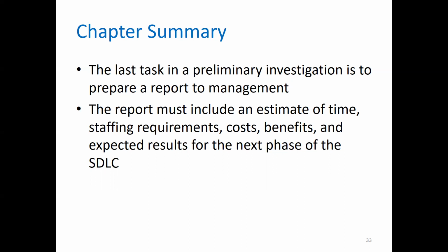So to conduct a preliminary investigation, certain steps must be done. First of all, the problem or the opportunity needs to be understood. Scope needs to be defined, constraints need to be defined, and possible scope creep should also be thought of.